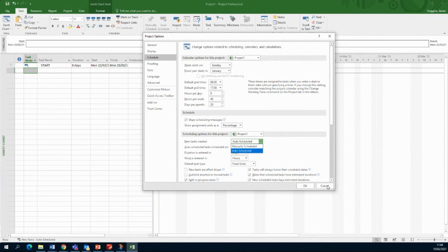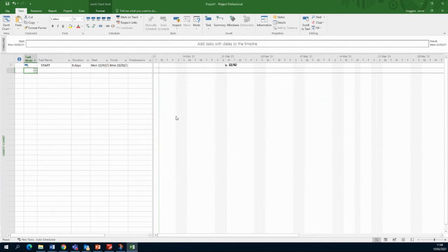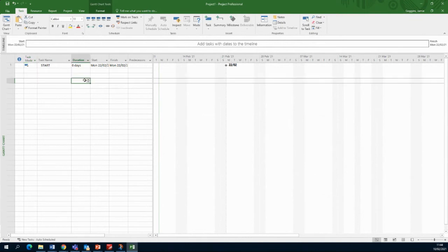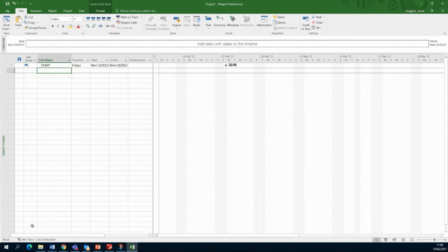So you'll see that in Microsoft Project, there are several ways, several shortcuts to do the same thing. So I'm just kind of highlighting. You get used to picking certain ones all the time. So I'm auto scheduling each task. So that's one that catches out people. Usually it's kind of a grey color. It's not solid if it's manually scheduled, and it's solid once it's auto scheduled in there. So it's automatically scheduled. Okay, so start the project.